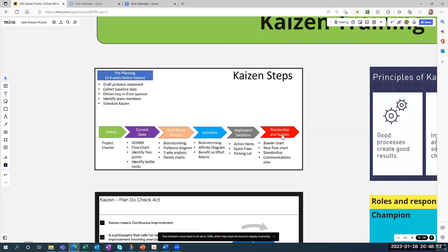The last step is very important — it's to standardize and sustain. Standardize is where you lock in the gains for the process improvements, maybe updating your procedures, training, and monitoring the process so you can see whether you're winning or losing. You'll use a bowler chart, make a new process map, fill out a standardized checklist, and create a communication plan for your stakeholders.